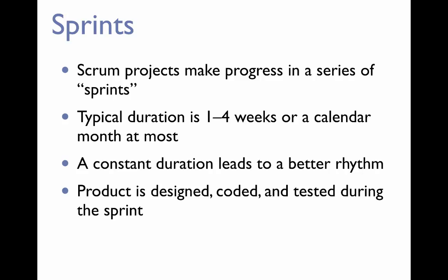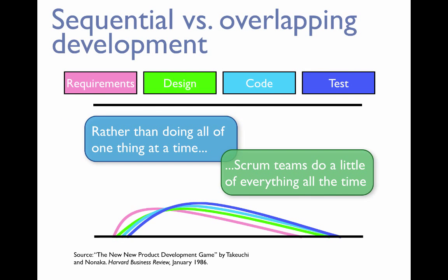That's the main thing that differentiates agile processes, Scrum in specific, from the waterfall process, right? In the waterfall process, first you analyze all the requirements, then you do all the designing, then you do all the coding and all the testing, and then everything falls apart. In Scrum, you overlay all of that in one little sprint time box of 1 to 4 weeks.